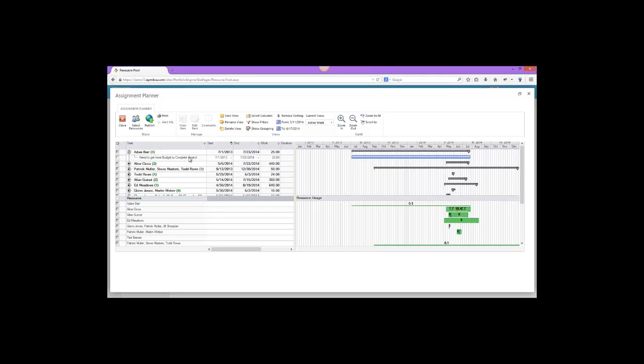and he's working on this particular task. It's scheduled to be this long. I can see it in my Gantt chart here, and I can make adjustments to that. Maybe he had 2 tasks that were set to start at the same time. I can move these tasks around a little bit, see how that affects his allocation down here in the window below. So it's a real-time tool that allows me to view and see what everybody's working on, all of their